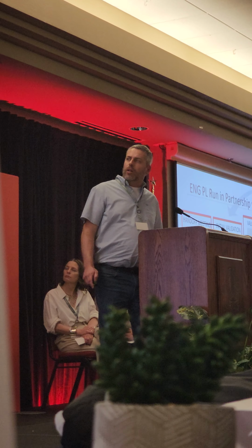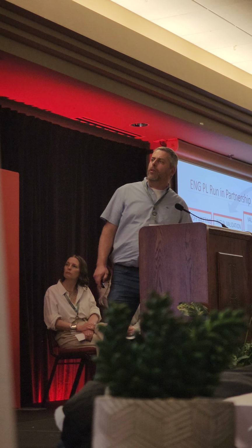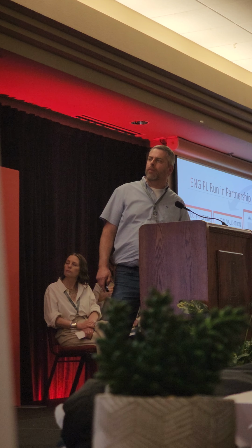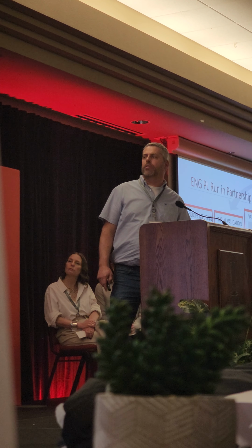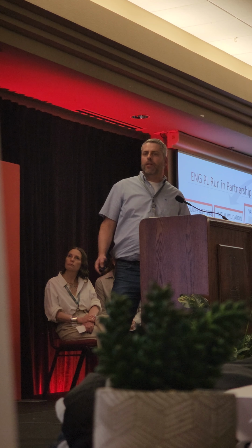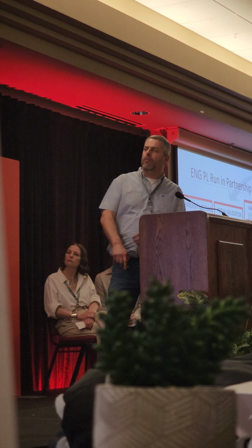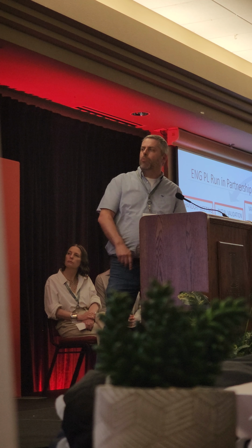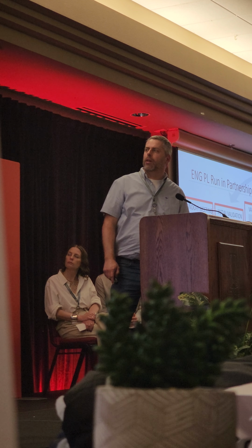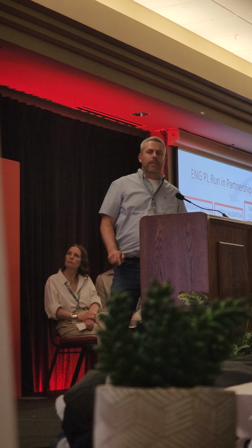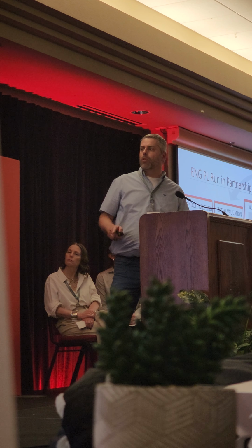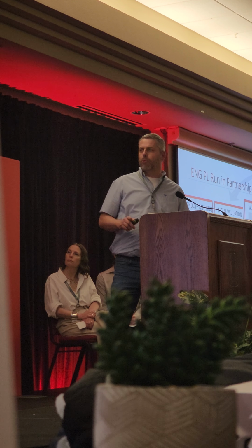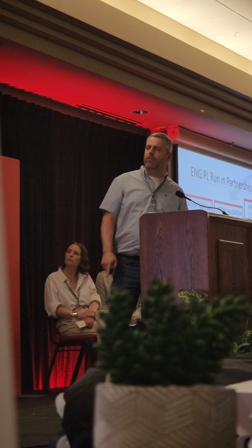So once it hits product launch, we have a handoff meeting. It's every Wednesday, where we go over the work instructions, if there's any care abouts, and any challenges that came up during their validation run. Then we do a small batch validation, 20 to 40 items, just to make sure that we get the same results as product development did. What we want to try and avoid is train the associates on a process that we then have to go back and change. So that's where we start with a small batch.